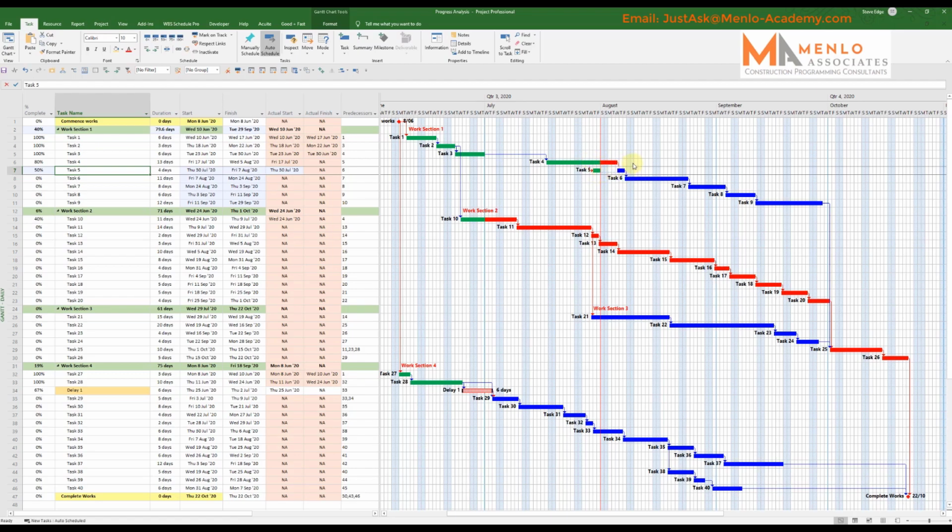This hasn't moved back with it because it's still trying to match the logic. It's still trying to carry the logic. So the remaining work is staying in the logical sequence of this job finishes, then this one can carry on. Now let's say this one is also, say, 50%. And again, you can see, although I've got 50%, it's trying to manage the logical sequence.